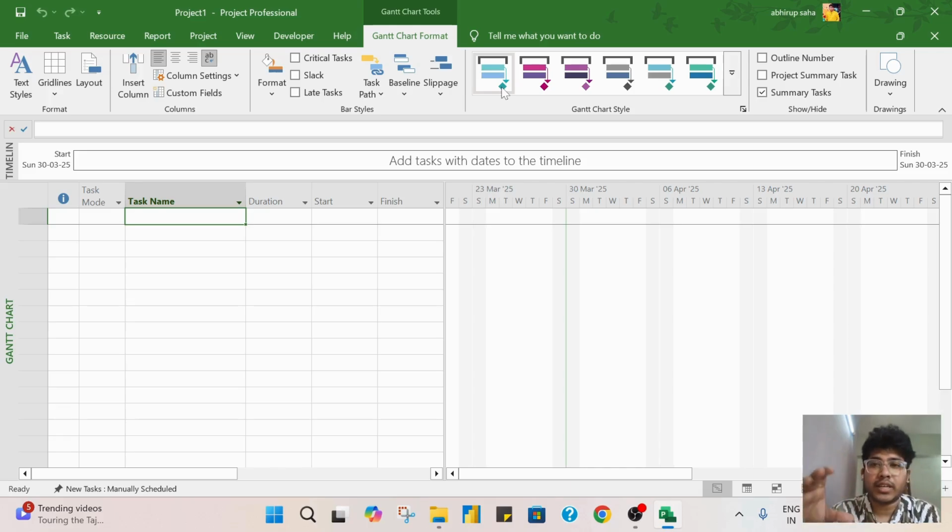After that, I can also segregate it further: I want to create zone A building number one, zone A building number two. So basically, this is the work breakdown structure. That means we segregate each layer, like a kind of ladder step. So we break our work into each section. So that is the reason.